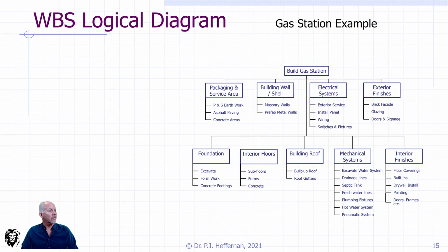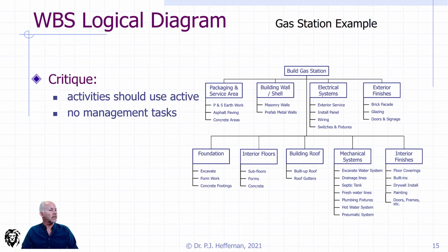So let me move that out of the way and bring up my critique. A couple things. First off, the activities should use active terms. We talked about that on a previous slide. So you should be painting something, building something, constructing, erecting, digging. We should be a little bit more active in the actual activities once we get down to the bottom.